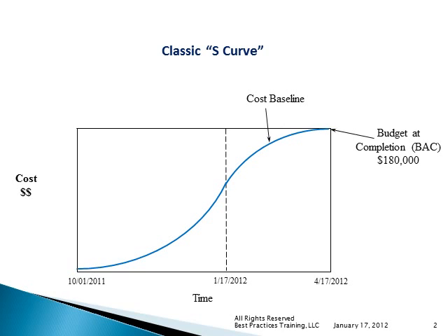And then as we near the end of the project, that spend rate starts to drop off. We've completed deliverables, therefore we can release resources for the project. We're not using as many of the tools and equipment or facilities, so our spend rate starts to drop off. So this is an S kind of lying on its side, showing the typical spend rate for a project. This is the cost baseline, and we're estimating that in our initial estimates, we're going to spend $180,000 for this project when it's all said and done.